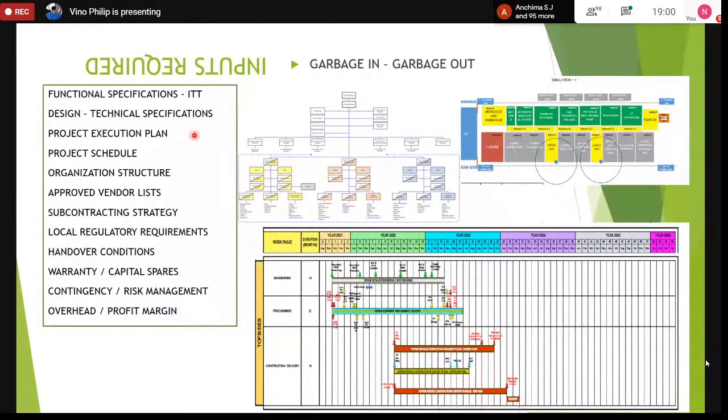The proposal team talks to the execution team, finds out their capacity of new work that they can do based on the expected milestones for delivery to the client. Then we have to define the project schedule based on that execution plan and within the constraints of where we are doing each component. So some components will take longer in certain areas of the world. Some components can be done quicker because they're more efficient geographical location.